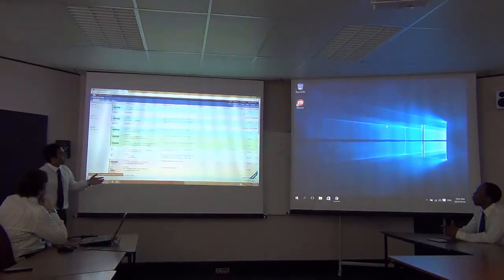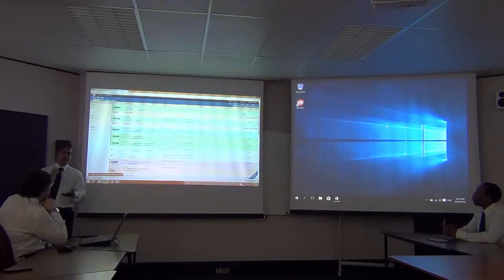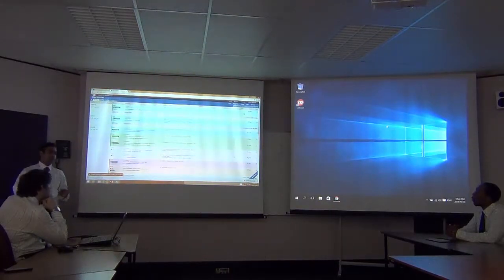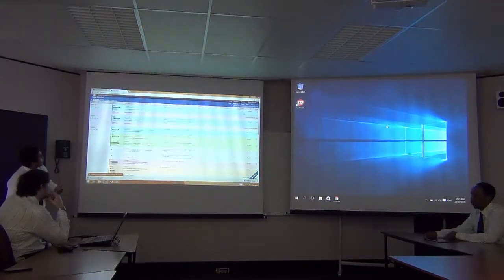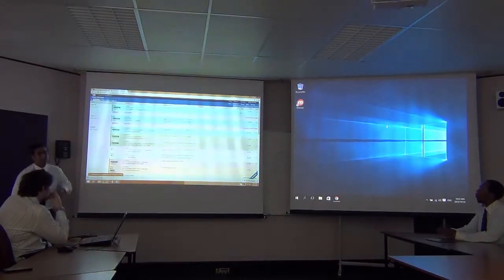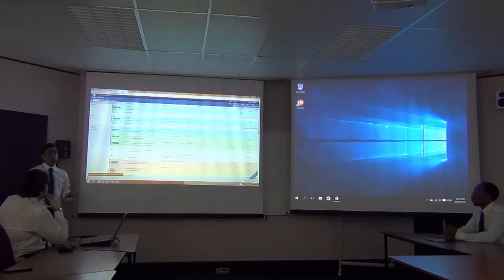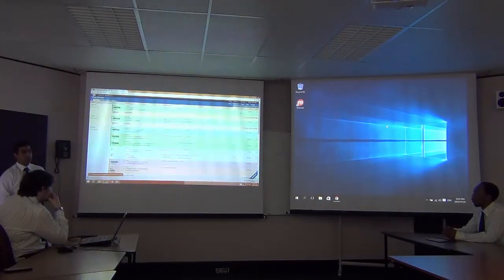And we said that each person can do one velocity per day. So there's 6 team members, so that makes 6 velocity points per day. And then we assigned a point to each user story. So for instance, for sign up, we said it will take approximately 1 velocity point. That's 1 day approximately to actually complete it.